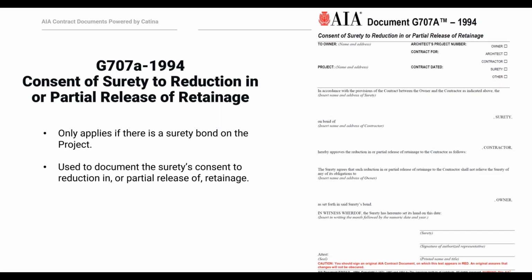So you really should be paying attention to whether you are getting lien releases from all the people and all the subtrades that are listed in the G703. But the G703 is really the best way, short of a sworn statement like the one Sarah's been talking about, for an owner to understand how money is moving through the project, and what items the architect has approved in their review of the applications for payment. Sarah, you want to correct me on anything there? No, Mike, you hit it out of the park.